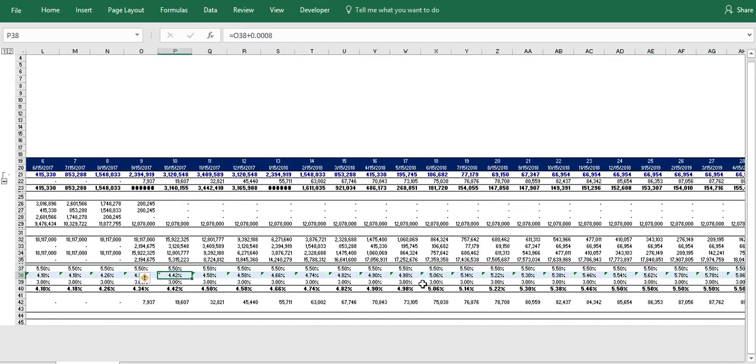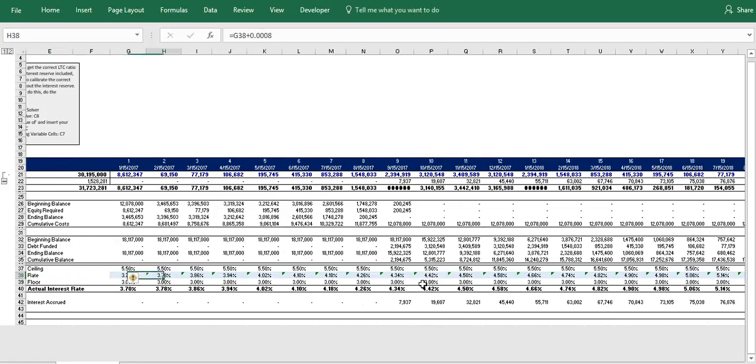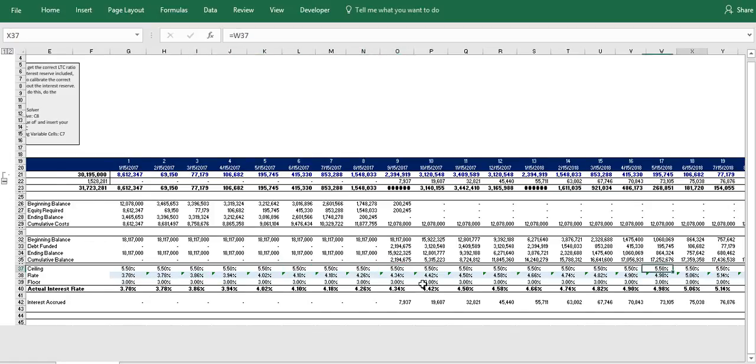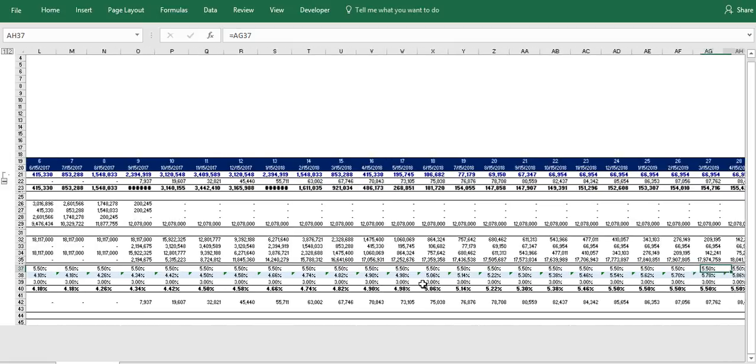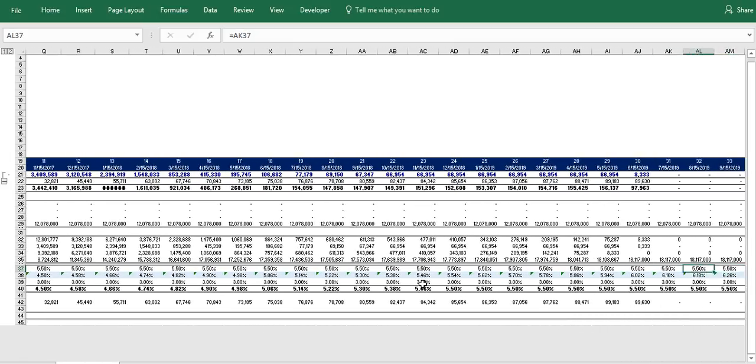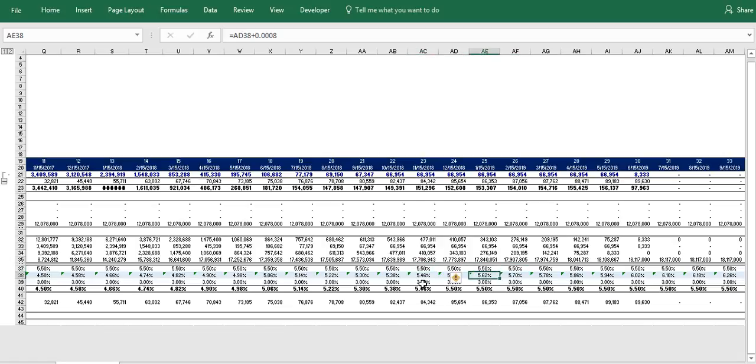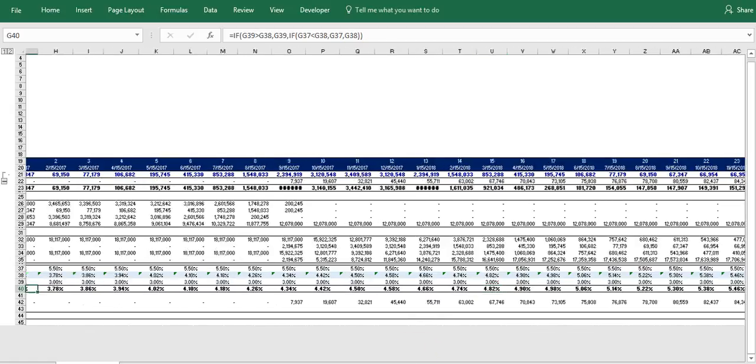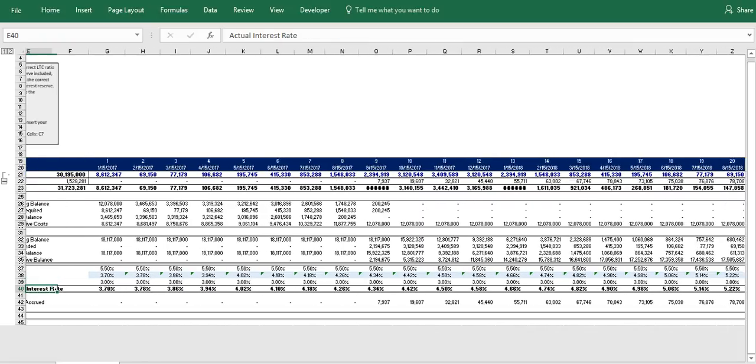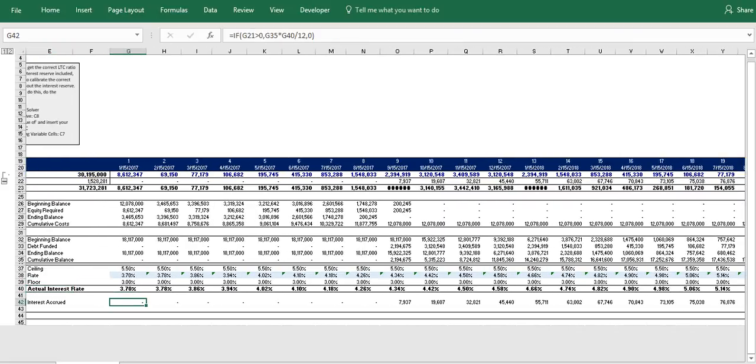And so in this case I just put eight basis points. I had the interest rate growing by eight basis points and we have our ceiling above set at 5.5%. And you can see as this grows, once we get our interest rate above the 5.5%, we lock in at 5.5. So it will never—this specific construction loan will never charge more than 5.5% interest.